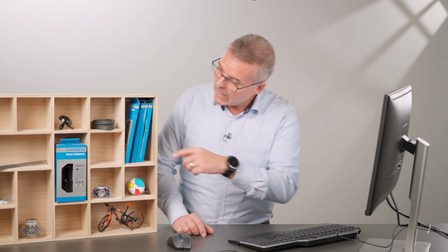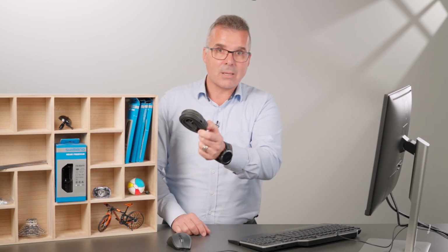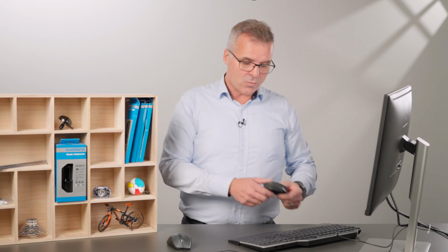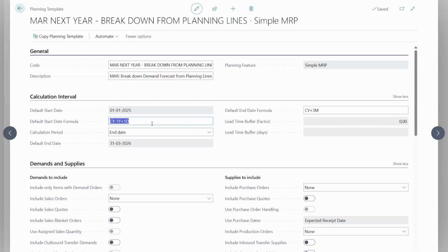down, have a long lead time, you need to figure out what your longest lead time is. Because if you are one year maybe to supply, if you have a hierarchy of 12 levels and all the small components in the bottom of the layer actually have a rolled up lead time of 12 months, then you have to start 12 months before to actually make forecasts or supplies for that item. So therefore you have to figure out how to set this one. In our example, we set it in the beginning of the year before.